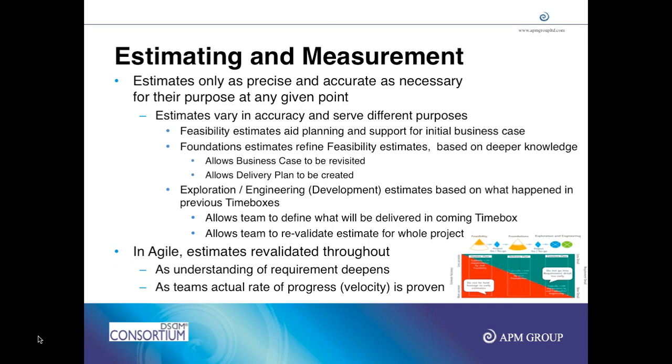Then what you do is you do the ranking. So you have ranks, for example, must have, should have, could have, or you can use business value. So first collect 100 requirements and then sort them in priority order. And then for each of them you have some story points. Now, story points is something similar to sizing in software projects, or if you have heard about function points in software projects. Story points basically is not an effort indicator, but it is just a rating given by teams.